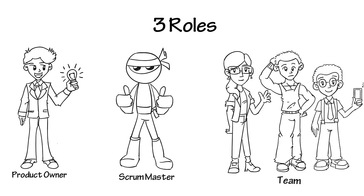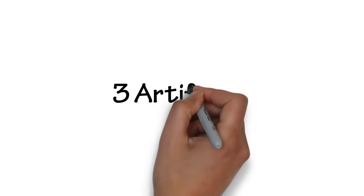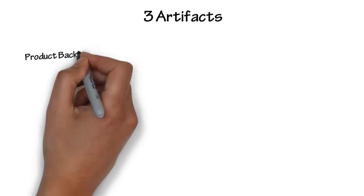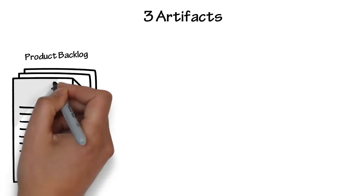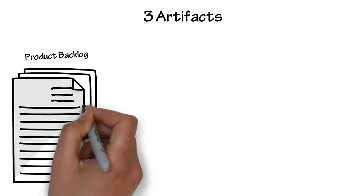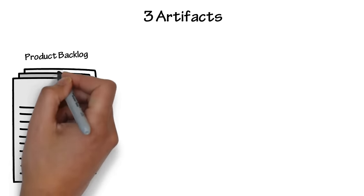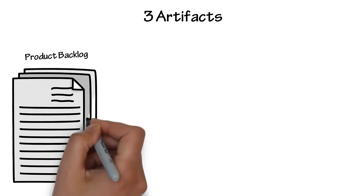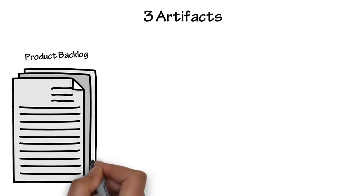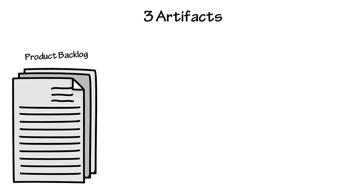There are three artifacts, or documents, that are used in Scrum. First, the product backlog. This is where product owners create a prioritized list of features, known as user stories, that could go into the product. This list evolves and changes priority with every sprint.